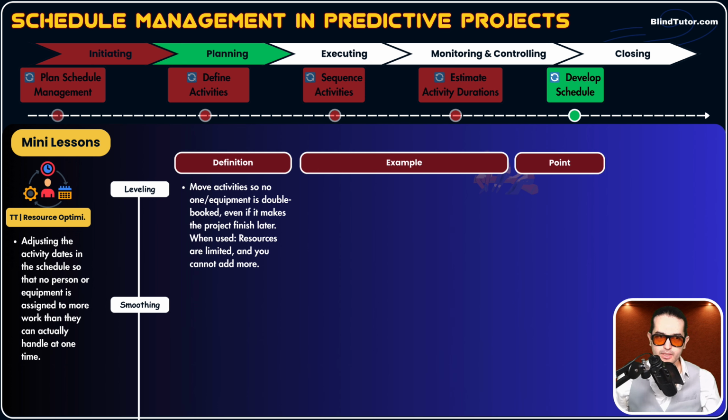Now, guys, one question for you. We had a path in our schedule network diagram called what? Critical path. What was the critical path? The critical path had some characteristics. One of the most important ones is that our critical path shows the project's duration. This is the longest path that shows our project's duration. Am I right? And the second characteristic, we said activities on the critical path have a total float of 0.